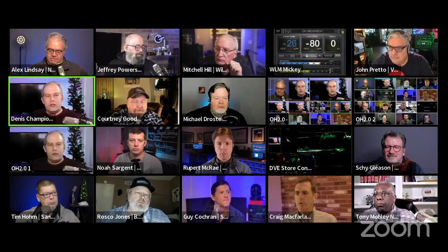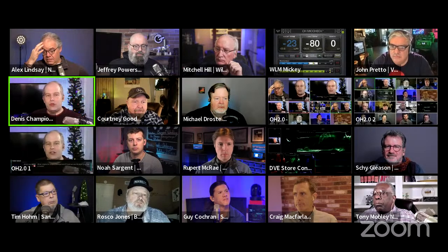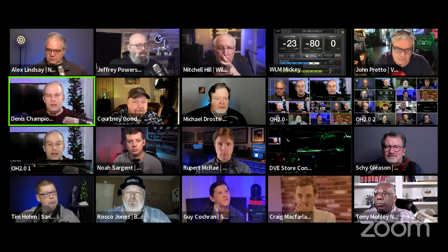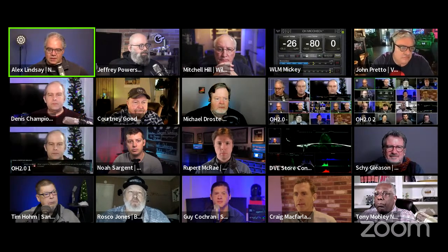Noah Sargent from Fullerton, California has the next question. What is Agile for project management? Could we use the Agile workflow in media? Go ahead, Craig. So there's two basic philosophies around project management. One is typical waterfall, where one step follows another, and the other is Agile. Agile in software development is really helpful when the end product isn't known entirely or is somewhat flexible. So you're not designing and building all this stuff only to realize once you launch that it's not what the public wants. By iterating, you discover and learn along the way. You don't build skyscrapers or bridges in the Agile method because you can't keep iterating.